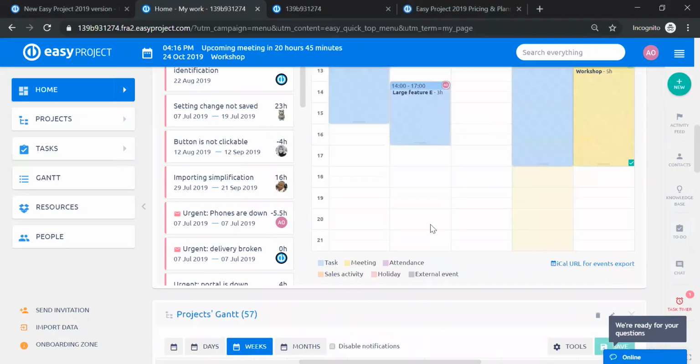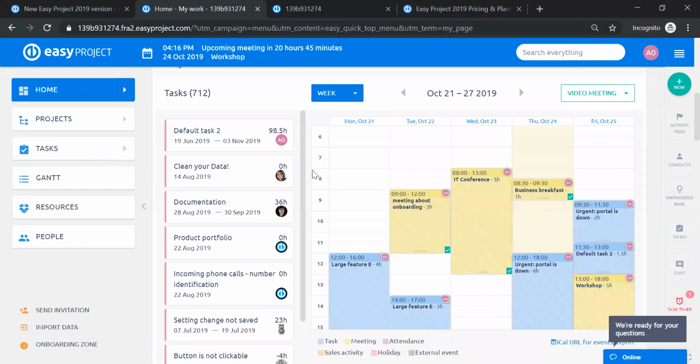The important thing when working with scheduler and tasks is that every task has to have some estimated time remaining in order for it to be planned within the day. The biggest advantage of this in regards to task management is that you can actually plan a task for a particular time of the day.